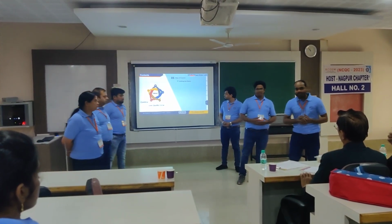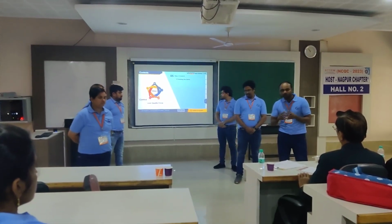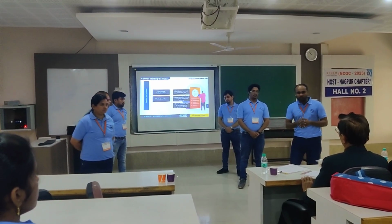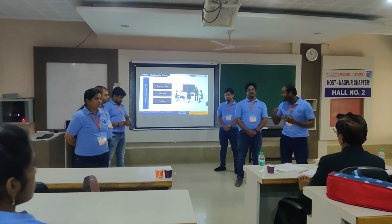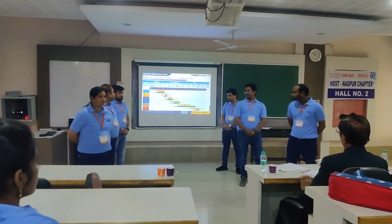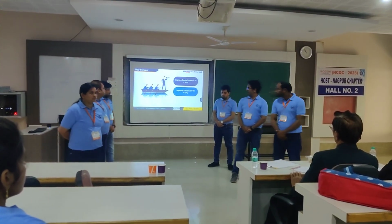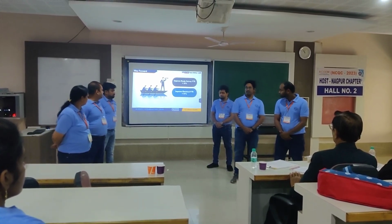So finally, having implemented the improvements, now we are moving into the control phase. In the control phase, we are going to explain how we are holding the gains and ensuring sustainability. We have established the SOPs with respect to the UDD checks and change in workflows, and also we are conducting monthly review meetings with the top management, stage-wise, function-wise, and area-wise. Thus, we control our project, and the updated milestone chart is as shown. We have completed well within the time. The way forward for our team is improving root survey FTR beyond 95% and improving electrical FTR beyond 97%.